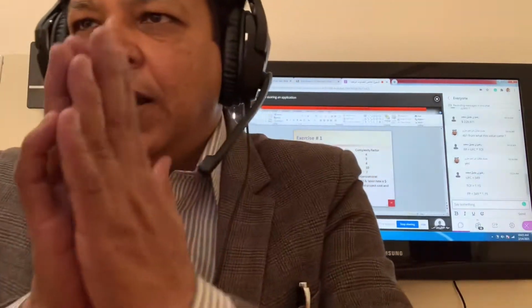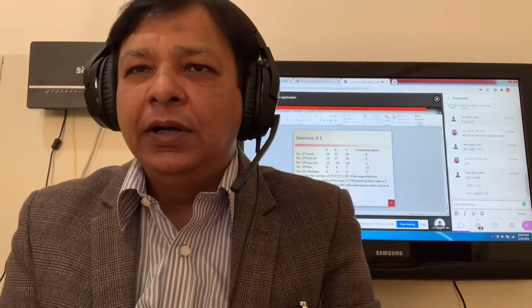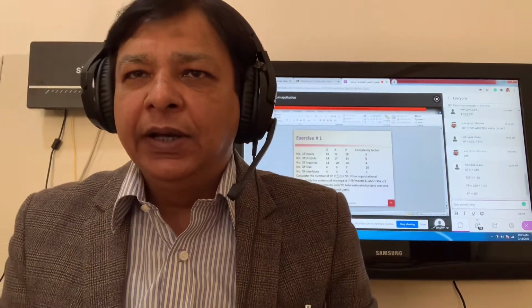In the last lecture, we calculated the function point. Remember the formula: function point is equal to UFC multiplied by TCF. We calculated UFC is equal to 349, and TCF is equal to 1.15. So we multiply 349 by 1.15. What's the answer? That is the function point of the new project, the current project we are doing: 401. This is what we calculated in the last lecture.